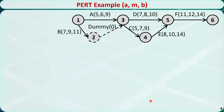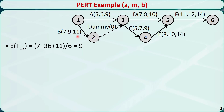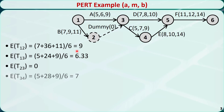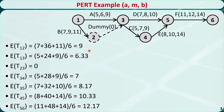Let's check PERT with this example. We have seen this house building example in previous videos. We use PERT to estimate the values of A, M, and B for every activity. For example, under the most favorable conditions, the duration of activity B, represented by t12, is 7 days. Under the most likely condition, the duration is 9 days. And under the least favorable conditions, the duration is 11 days. Using the formula: 7 plus 4 times 9 plus 11 divided by 6, the expected duration is 9 days. Following the same procedure, we can find the expected durations of all other activities. The duration of the dummy activity is always 0.